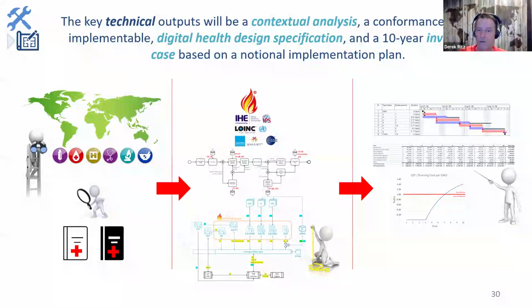Because when you get into the standards writing business, it's not a one and done. You actually have to now create a national standards body that's going to own this for the rest of time. And mercifully, we made zero. This was, in fact, at the time, the International Patient Summary. We adopted the IPS with 0 changes, which was perfect because it worked and we didn't break it.